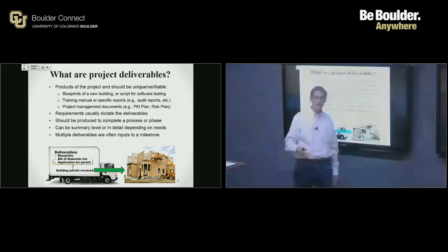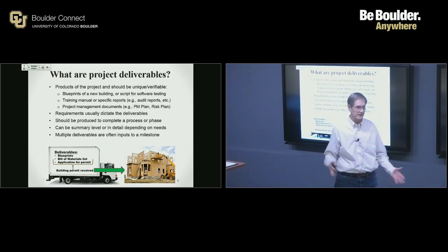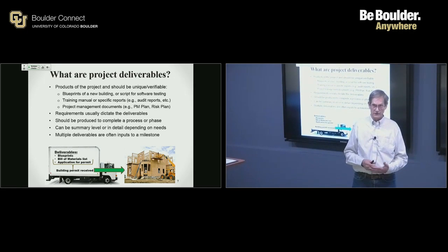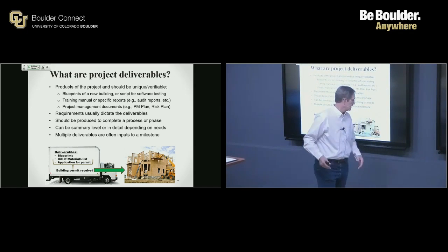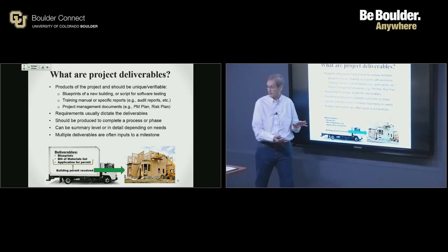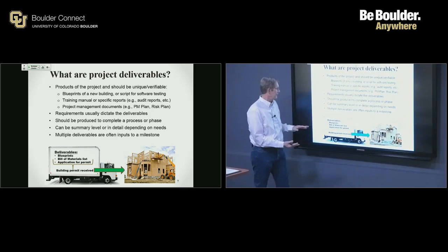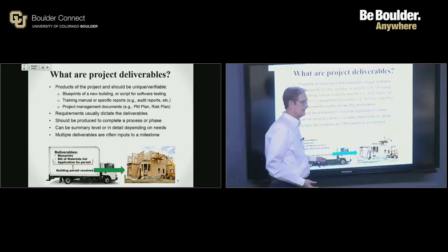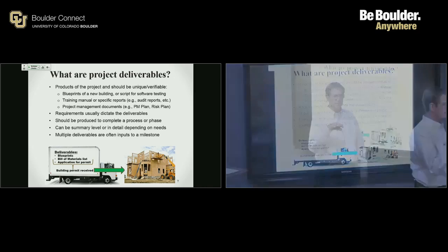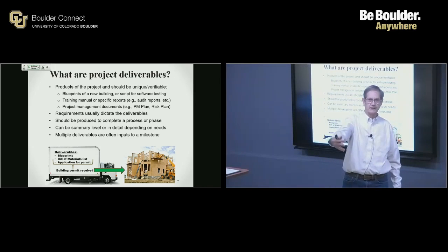Before we can ever pound a nail, before we can ever set a form, before we ever dig a shovel in the ground, we have to have a building permit. And so we have to go to city planning, and we would take a set of deliverables forward. Could be several. And then one of the activities on my work breakdown structure and on my schedule is to obtain the building permit.